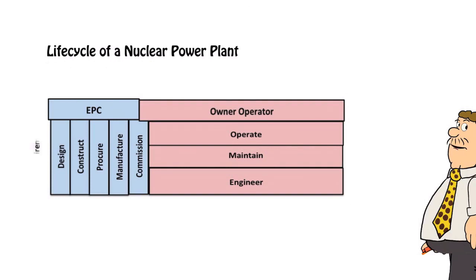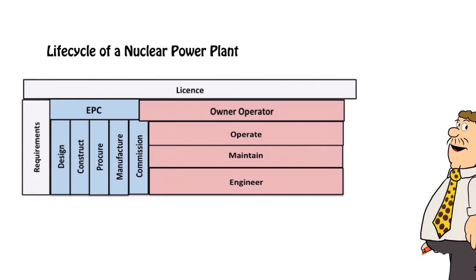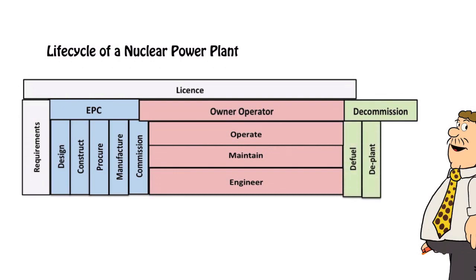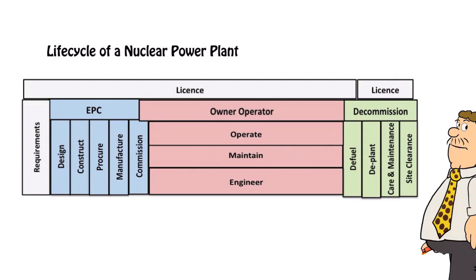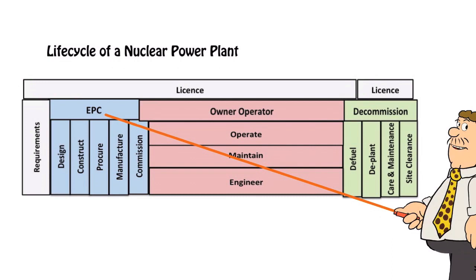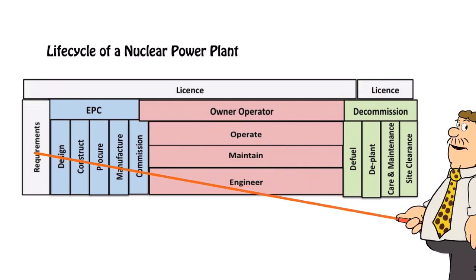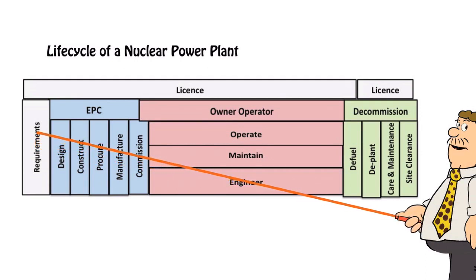Commissioning is often a joint effort with the operations group. Depending on the country and regulatory regime, there will be a set of requirements that must be met by the design and build process. After the end of operations, we move into decommissioning: defuelling, deplanting, a period of care and maintenance, and finally site clearance. This is a long-term life cycle — the operational life of a station may be 60 or more years, the build process 7 to 10 or more years, and decommissioning itself may take 100 years.